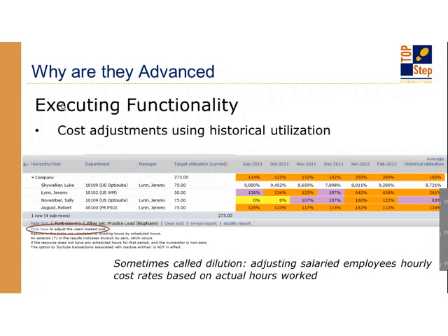So let's take the case of you have someone that works a 40-hour week and they're getting a regular salary no matter how many hours they work. If they enter in their timesheets 45 hours, the cost of that resource actually goes down because you're still only paying them for the 40 hours.